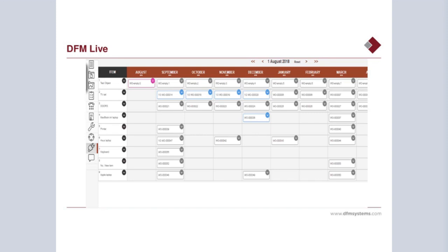Within our system, if it's being hosted on the website, you can actually upload your planned preventative maintenance schedule into a calendar, and using that calendar, allow the service engineer to upload his service records to the website as he completes the service on the project. Or if equipment is swapped out because it needs to be replaced, that can easily be done by uploading into the website, and that way it keeps the full safety file as a living document on the project.